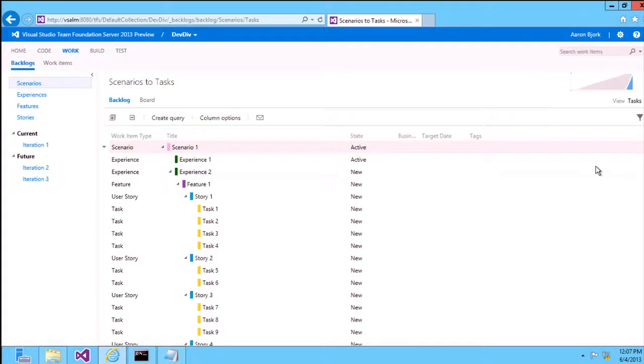I'm talking to the dev leads, and we're always estimating out in front of the team. And it's actually not me that's estimating, it's the team that's estimating. So we do what we call backlog grooming in the middle of every sprint. The team takes a break in the middle of that sprint, and they sit down and estimate stories that are further down the backlog so they know what's coming.